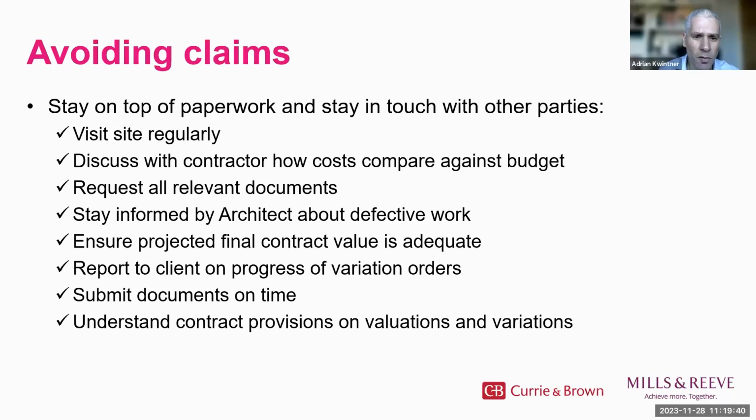They should regularly report to the client on the progress of variation orders, including cost changes, schedule extensions, and quality implications. The QS should also not rush the assessment of valuations or variations. It should be more than a glance around, but equally, the QS needs to work efficiently to submit draft valuation certificates and assessments of variations on time to minimize the impact on project schedules. Finally, quantity surveyors should carefully review project contracts to understand the provisions on valuations and variations. This is crucial for minimizing potential disputes.